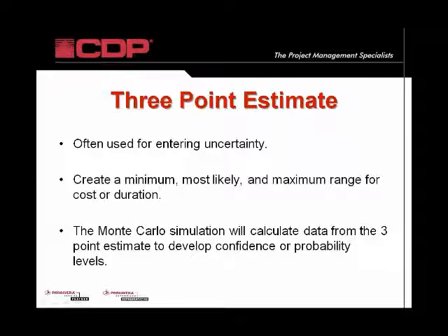So what we'll do is take some of these three-point estimates, put them onto the schedule, and then run a simulation where our bars move around and our costs change. We'll be able to develop confidence levels of hitting certain schedule dates based on that probabilistic data running over and over again. We'll see that trend curve develop, and the trend curve will be relative to our project schedule or our project estimate.